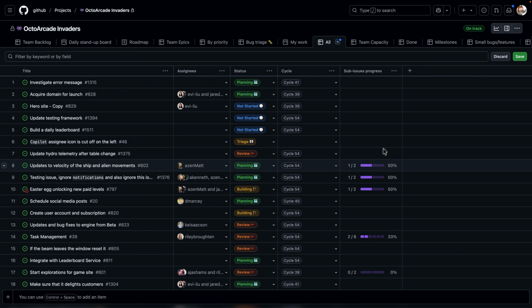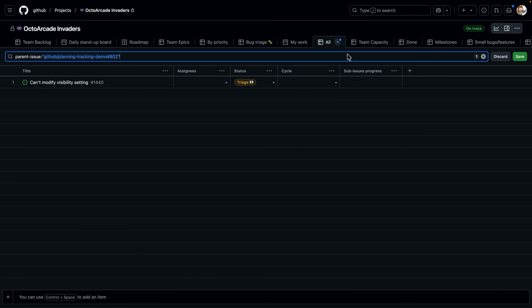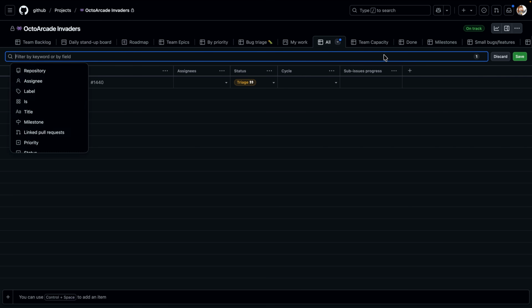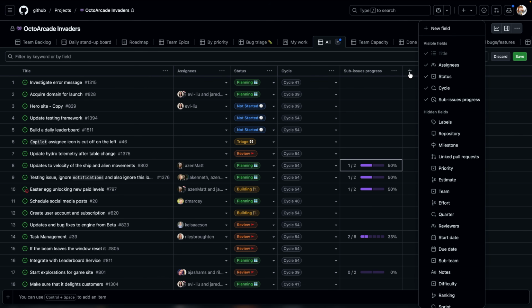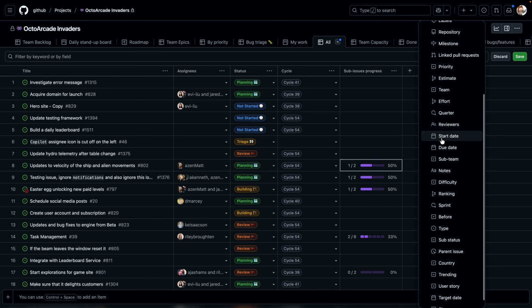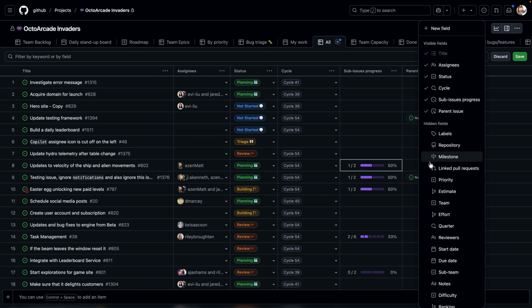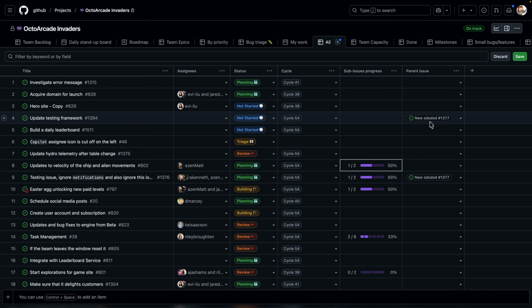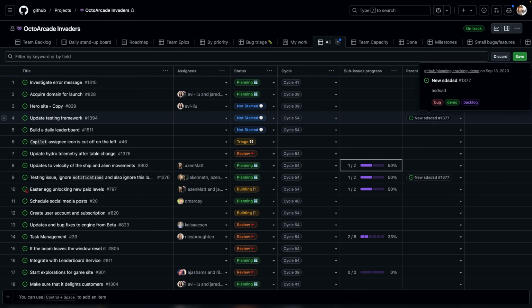We can also see that clicking into any one of these, on the field value there for the sub-issues progress, I get an automatic different filter that says, hey, what are all of the parent issues to this? So I can go both ways. I can look at the sub-issues to an item, or I can go and find its parents. In fact, I could even add a separate column here called parent issue. And so for any items here which are themselves children of some other issue, I have quick visibility and a link to whatever that parent issue is.